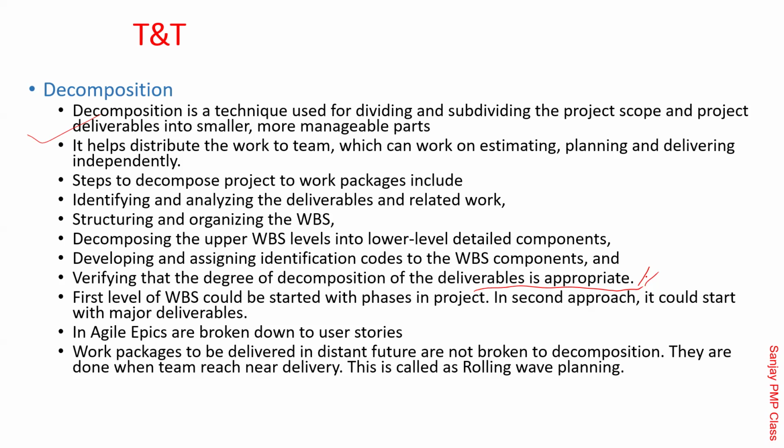The first level of the WBS could be the phases themselves. Some project managers, what do they do? They go ahead and make the WBS with the first level as requirement capture, design, development, testing. Under development, they will go ahead and set up the user login functionality and so on and so forth.